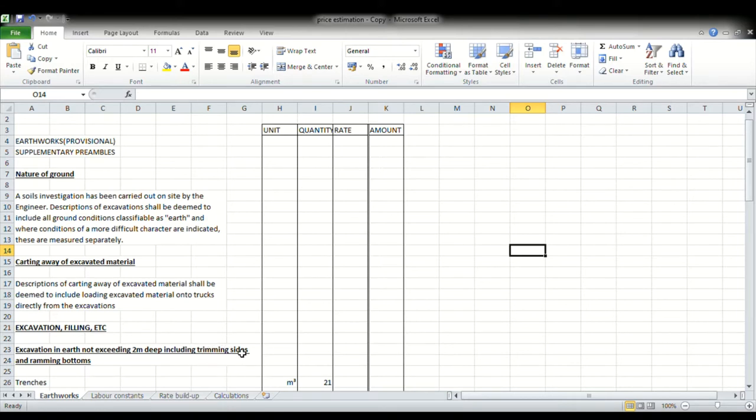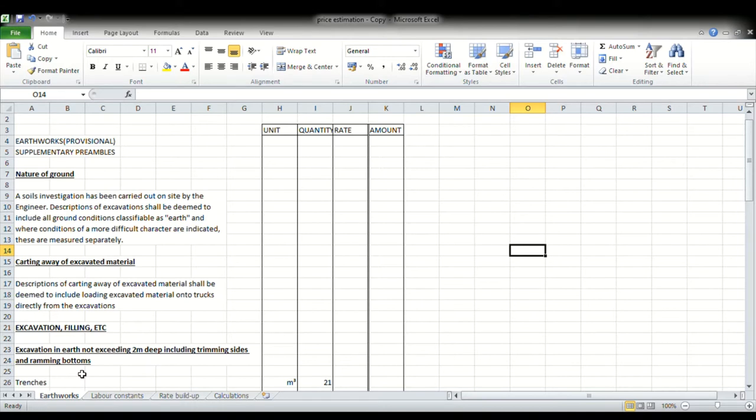And the third activity will be ramming bottoms. Now basically we are going to work out a net rate. Our net rate will be made up of the following labor activities: dig and throw out, that covers our excavation; the second one will be trim sides; and then the third one will be level and ram bottom.